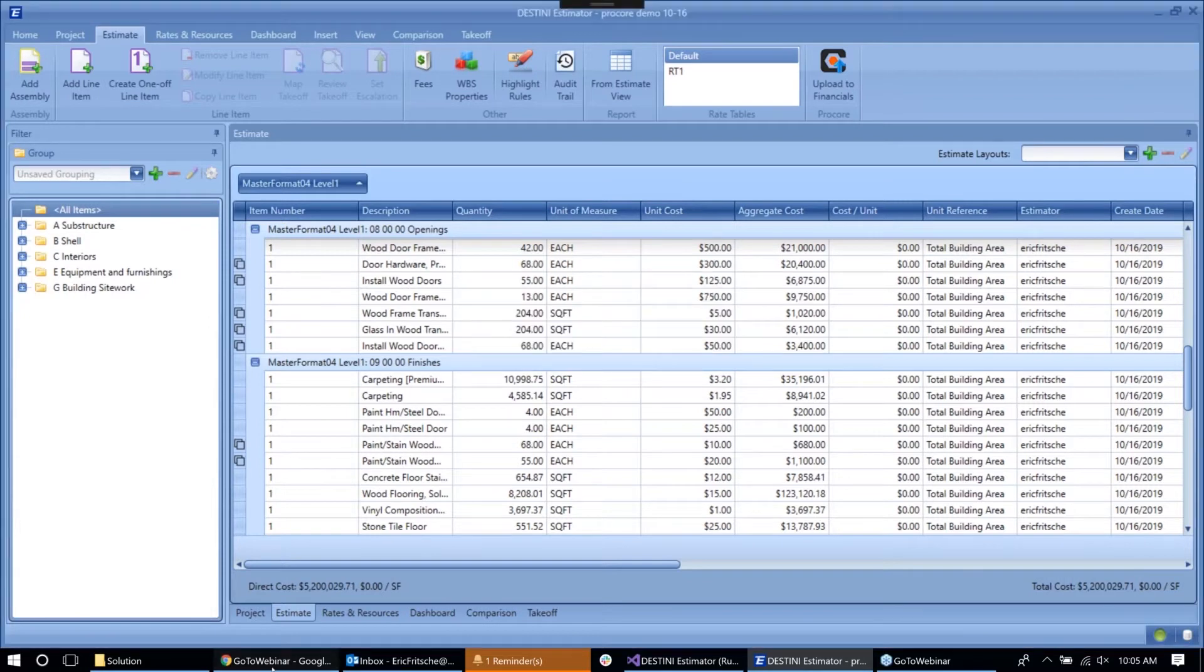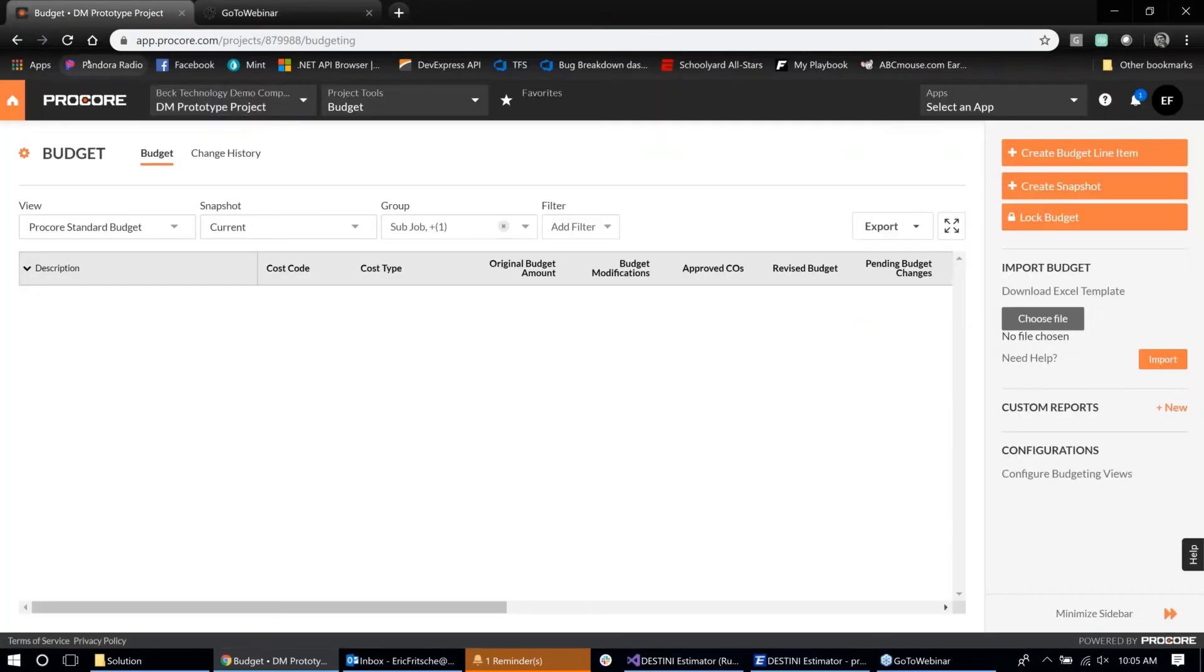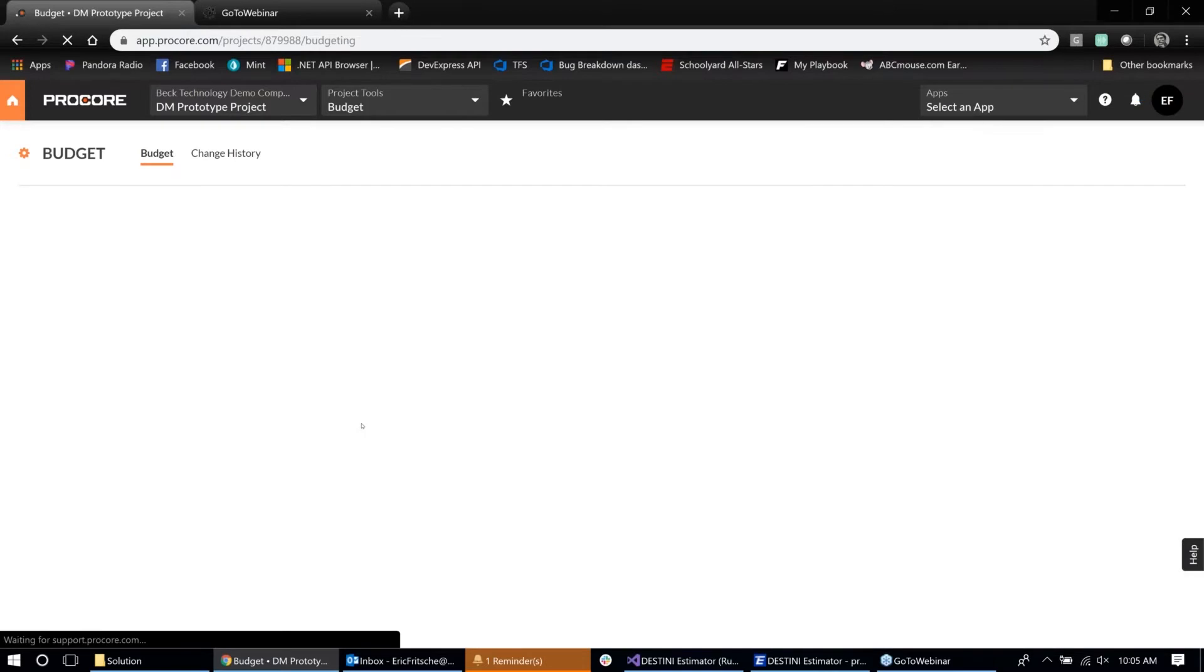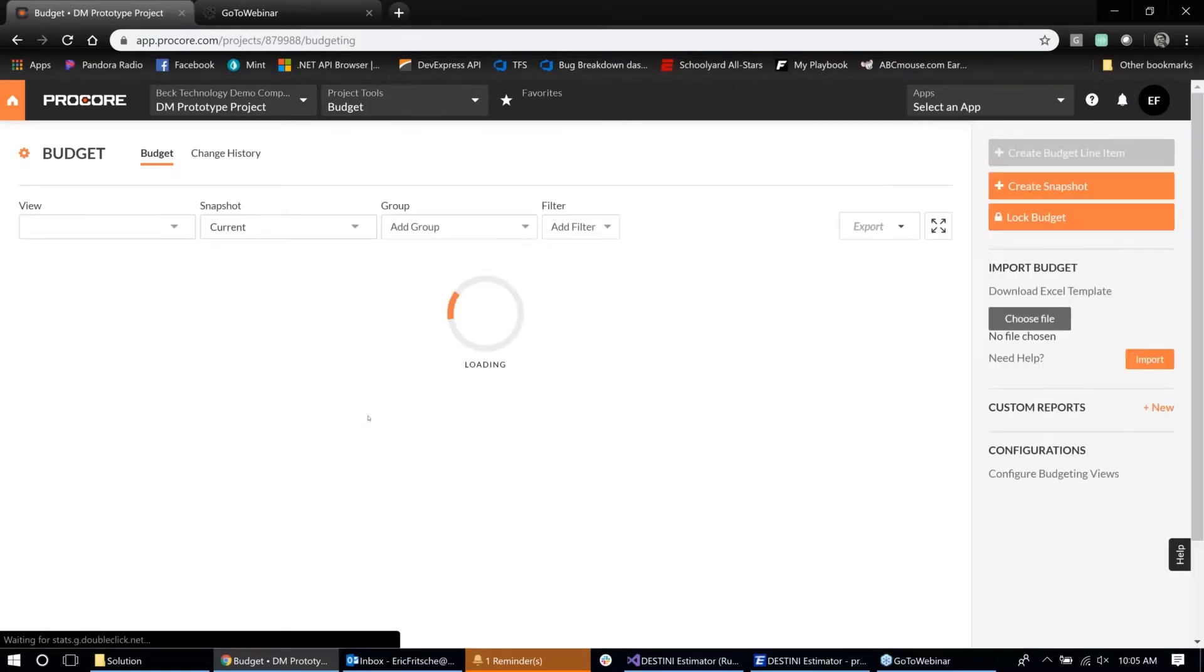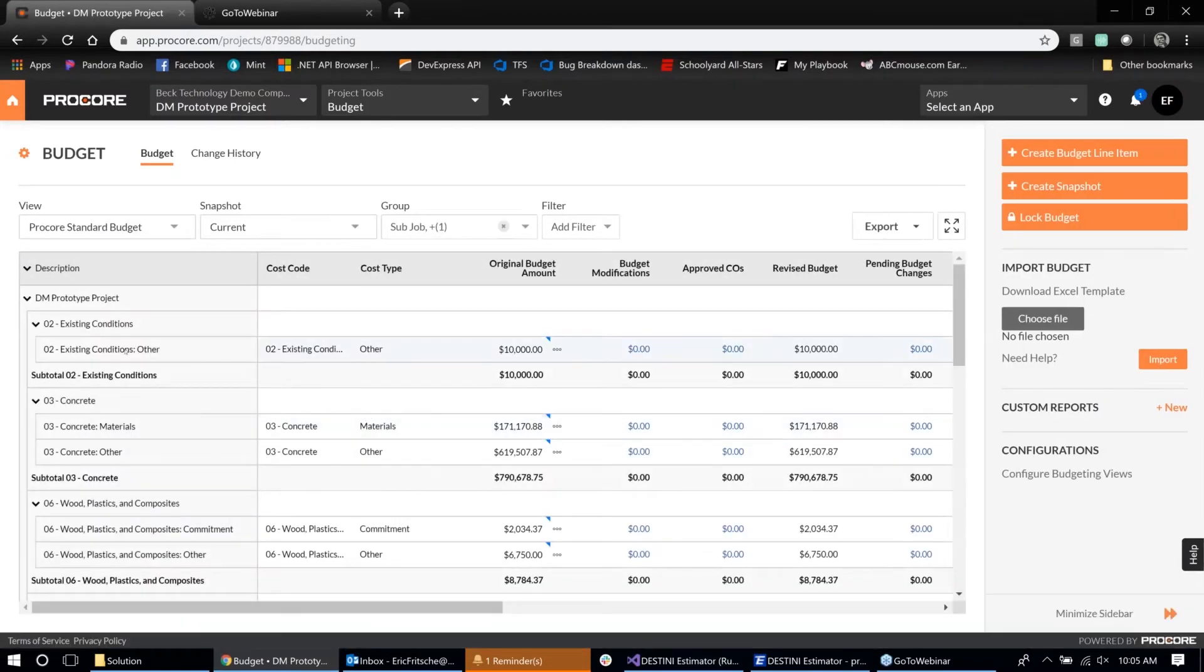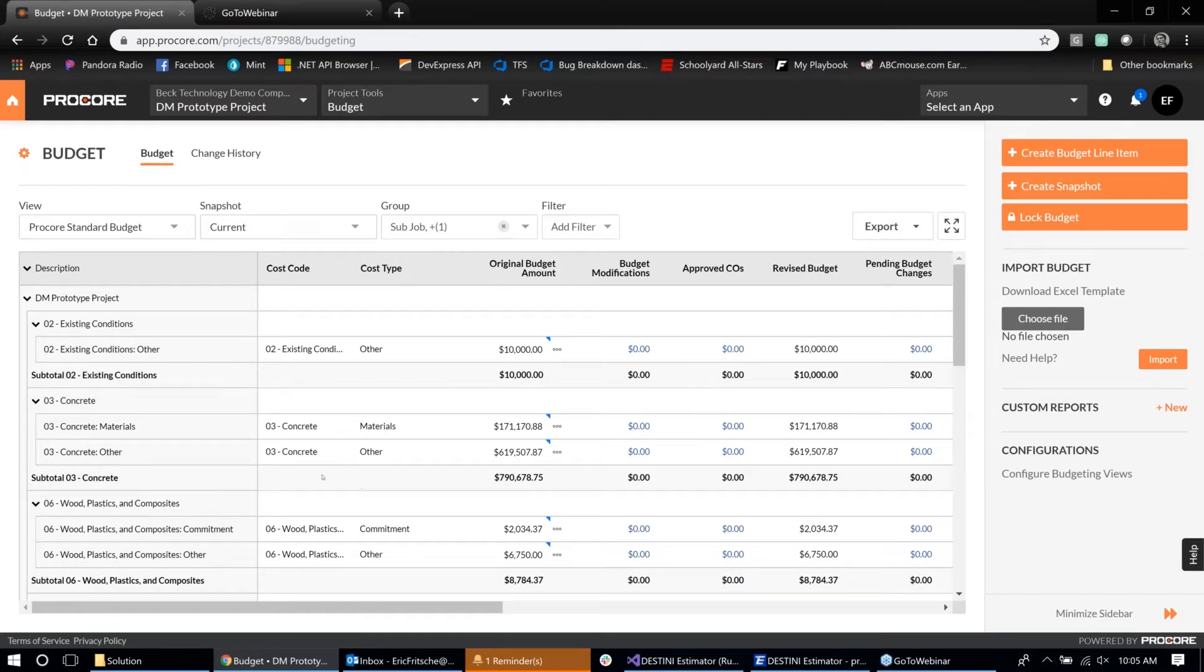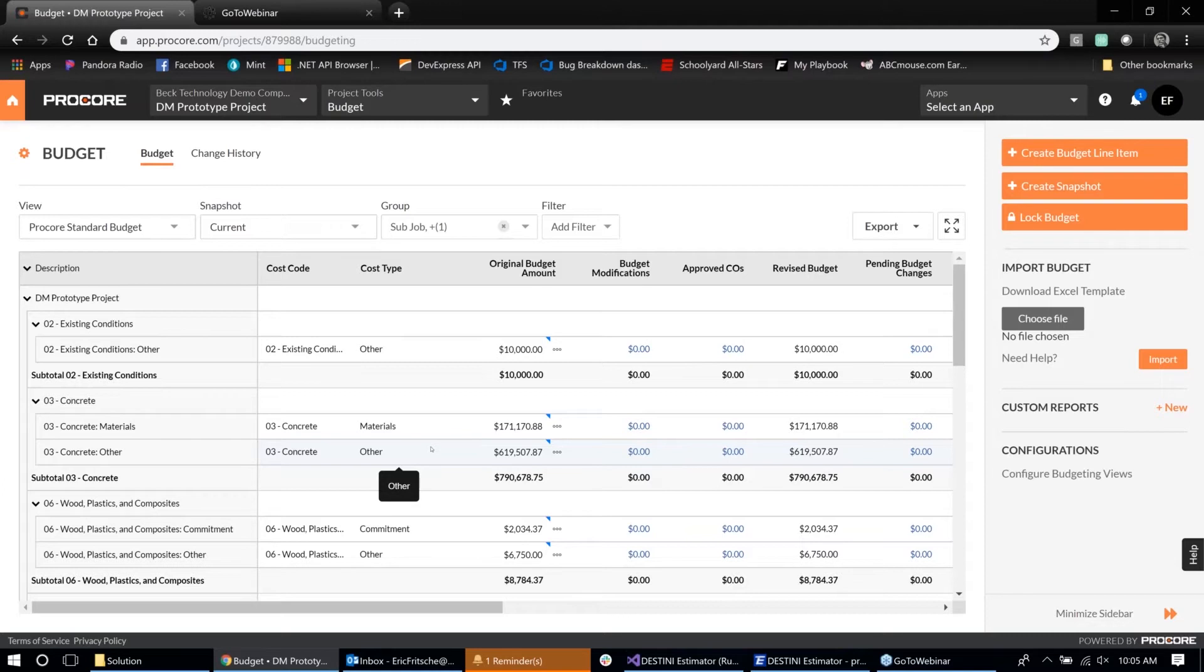And so we can see here inside of my project, once I refreshed it, it's collapsed all of those line items down into their specific budget items for the classification scheme that I selected and the cost types for them. And then this can then be handed off to the project team, to the financial department, to track the budget throughout the life of the project.